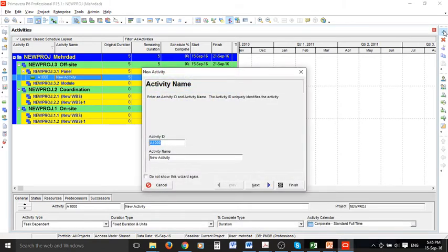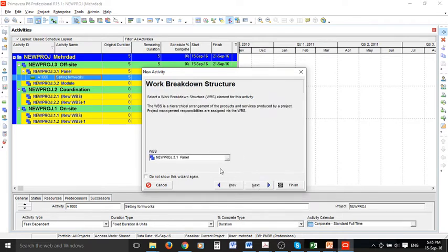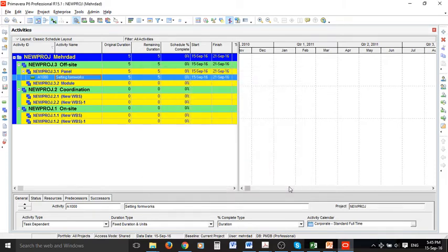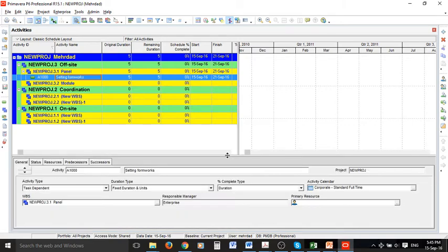A new activity is created. I can name the activity — in this case, 'Setting Formworks'. By pressing Next we can double-check if the WBS level is okay, and it is on the Panel, which is correct. Then you can select Finish.